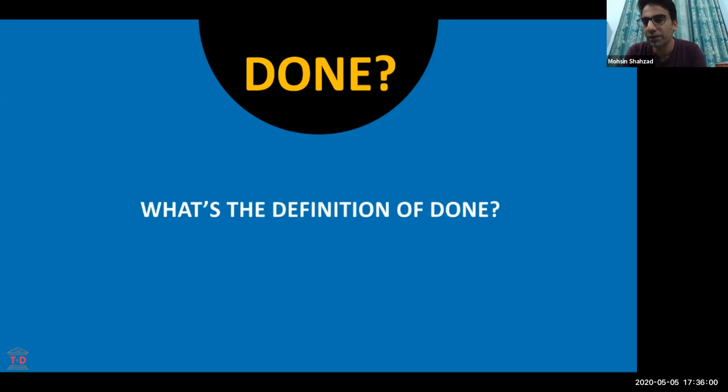According to my definition of done, these 3 tasks should be completed. According to your definition of done, 5 tasks should be completed. So why not define it properly, so we can all get in sync on this definition? The whole team defines the definition of done in the planning part. When someone says this task is done, they tally their task against the definition of done, and when everything on this checklist is completed, then we can mark it done.